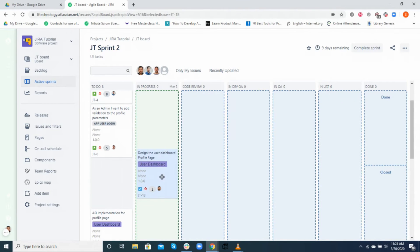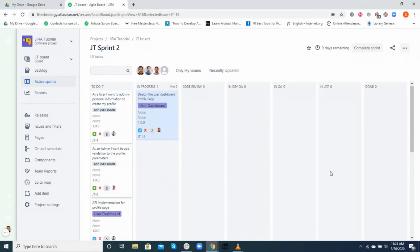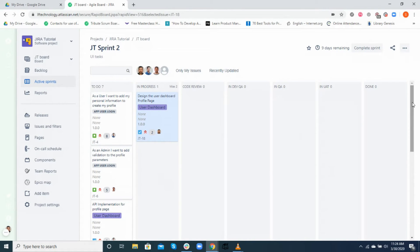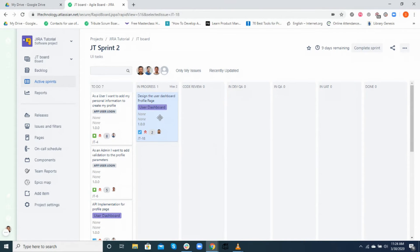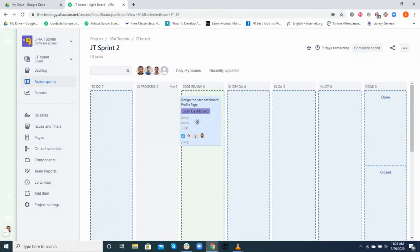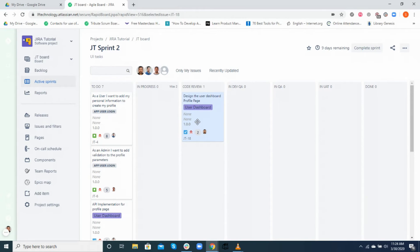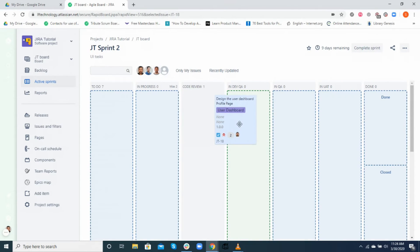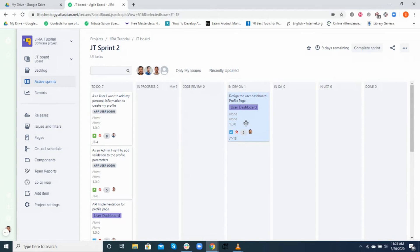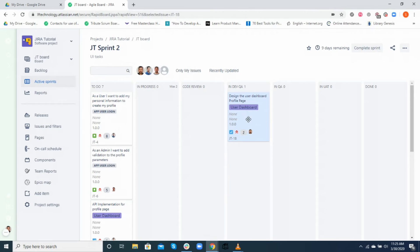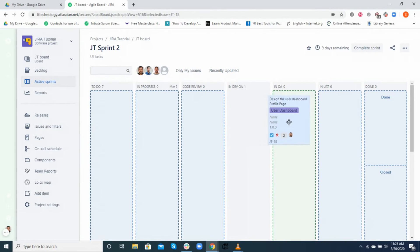Once he is done developing the feature, she will need to create a pull request and wait for it to be reviewed by her peers. At this point, the card will be pulled to the code review column. Once reviewed, the ticket will then be moved to the dev QA column, where first-hand testing will be performed by the developer in dev server.